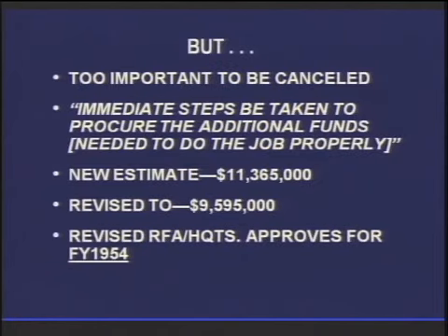In the first paragraph of this cover letter, they say, hey, this job is too important to be canceled. What you wizards need to do is go out and shake the trees and get the money so we can do the job properly. And look, we got a new estimate for you, not $9 million, it's $11.4 million. But don't worry, that includes the 20% escalation factor. Well, you can imagine how that flew, right?